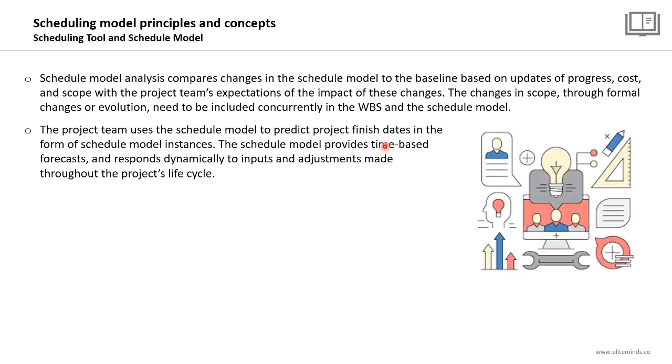The project team uses the schedule model to predict project finish dates in the form of schedule model instances. As explained earlier, once we have the schedule model, we can develop the baseline early in the planning phase in the project, and whenever a stakeholder or a senior in your organization requests from you as a project manager or from you as a scheduler an update about the project schedule model, you just need to take a schedule model instance that will be presented in a schedule presentation to the executives and decision makers. The schedule model provides time-based forecasts and responds dynamically to inputs and adjustments made throughout the project's life cycle.